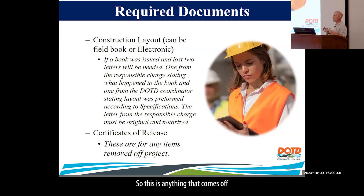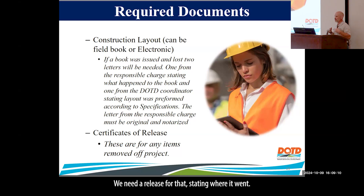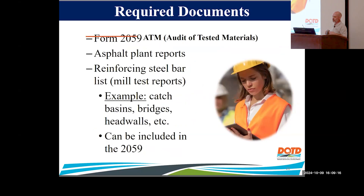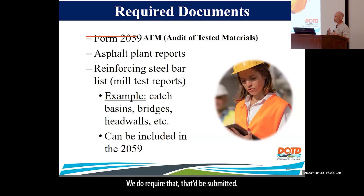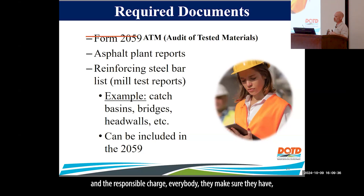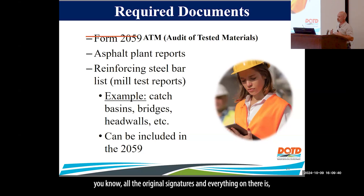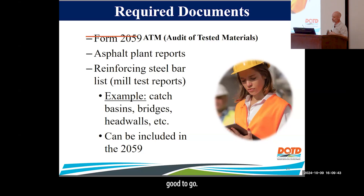Certificates of release: anything pulled off the project requires a release stating where it went, what item it was paid under, and all of that. The 2059 — now called the ATM, Audit of Tested Materials — must also be submitted with all the original signatures from the lab engineer, the coordinator, and the responsible charge.